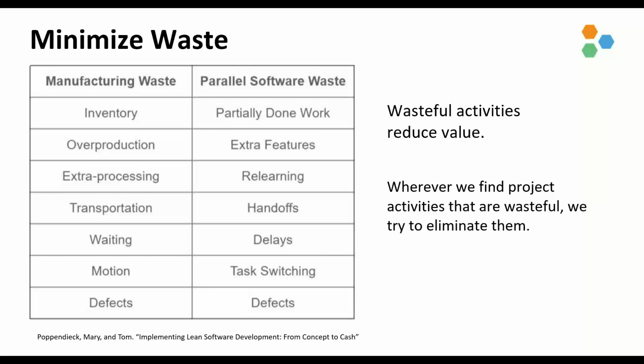And then we have task switching. Those are interruptions during execution, which cause, we all know how task switching can derail us, right? If we have interruptions when we're executing, it can cause ineffectiveness in our time usage, like if we're switching focus or priorities, working on more than one thing at a time, or we're serving multiple customers at once, and we're fixing issues while we're developing new features, and so on.